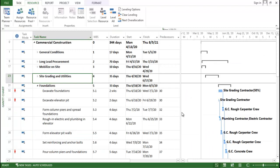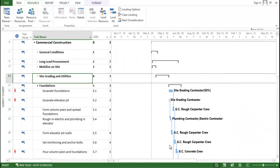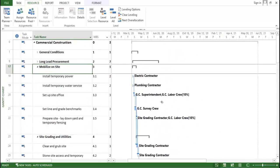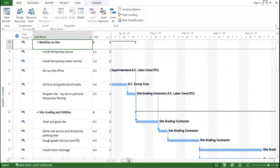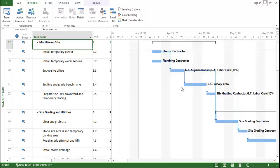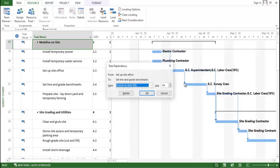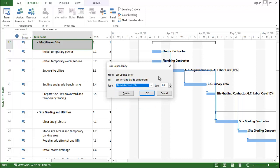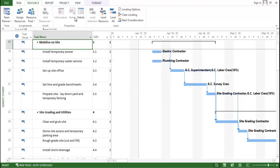Now let's look at resources, but first I want to highlight the Gantt chart, which is a very important part of project management. The Gantt chart reflects the activity links — start-to-start, finish-to-finish, start-to-finish. You can click on a task to see its dependency type. You can also define lag here: if a task slips or starts earlier, you can update that scenario as well.